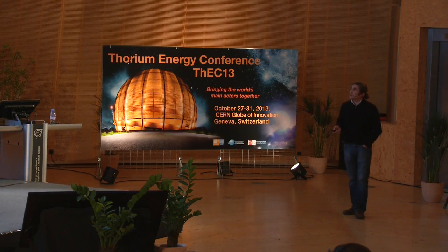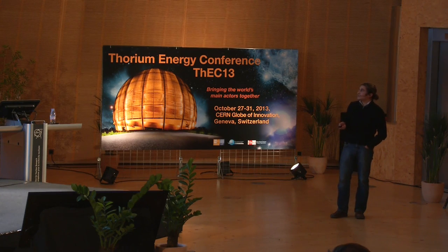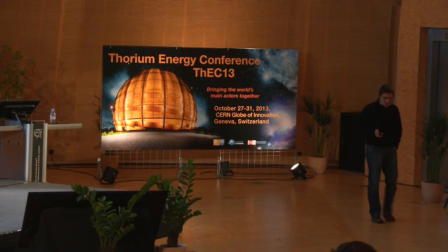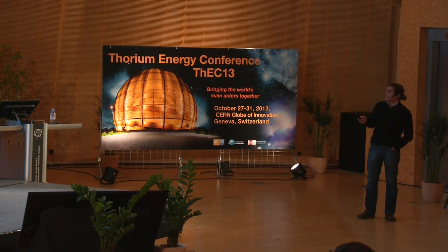The LEBT conceptual design is achieved, and we are not even in the detailed technical design, but in the construction phase of this beam line. The source is already at ThEC for commissioning, and all the line will be manufactured and installed at LPSC in Grenoble, and we will do a complete test of this line at LPSC in Grenoble.